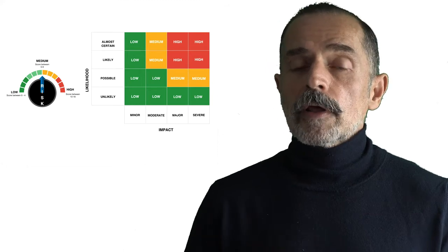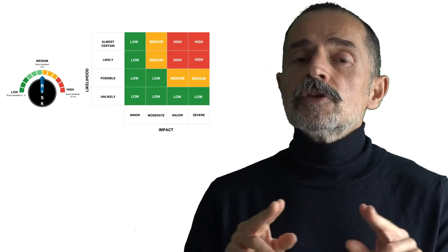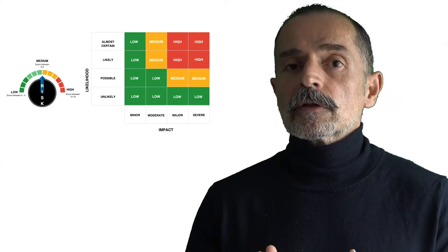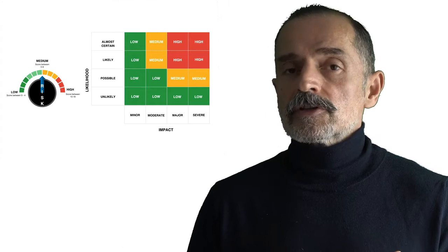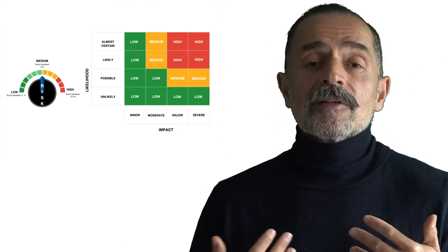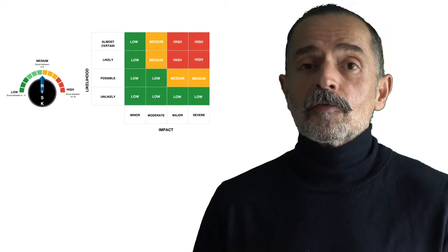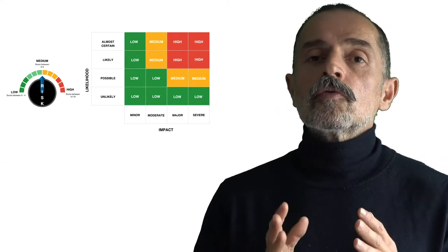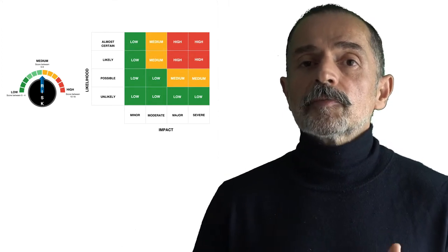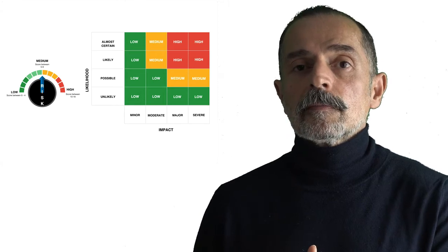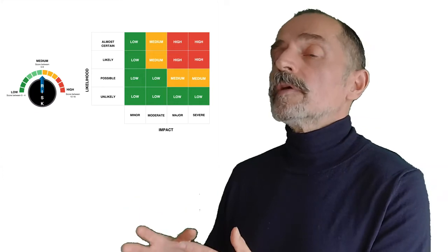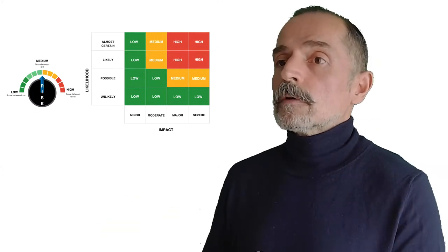But as I mentioned already, don't forget that you design a risk management strategy during the initiating and planning phase of your project. But actually, during implementation, unexpected risks occur. Some of the expected risks are not confirmed and don't happen. So the risk management plan has to be constantly updated as part of your monitoring system, which also means that risk mitigation activities are always changing during implementation.